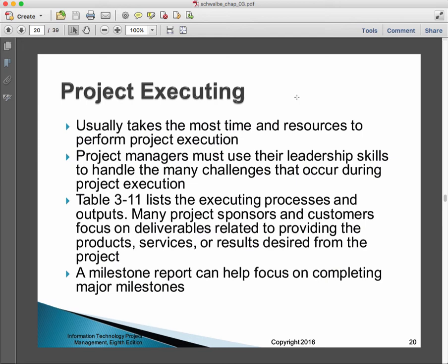Typically, a milestone event, in order to qualify for being a proper milestone for me, it has to pass what I call the pizza party test, which is to say, if in fact we're going to throw a pizza party for the stakeholders, and you say that we're going to celebrate the achievement of whatever the milestone is, people would get it. They would go, oh yeah, that's important for us. Let's go have some pizza and some refreshments and celebrate because we've achieved something great. Okay. If it doesn't pass the pizza party test, then it's probably not a well-chosen milestone.